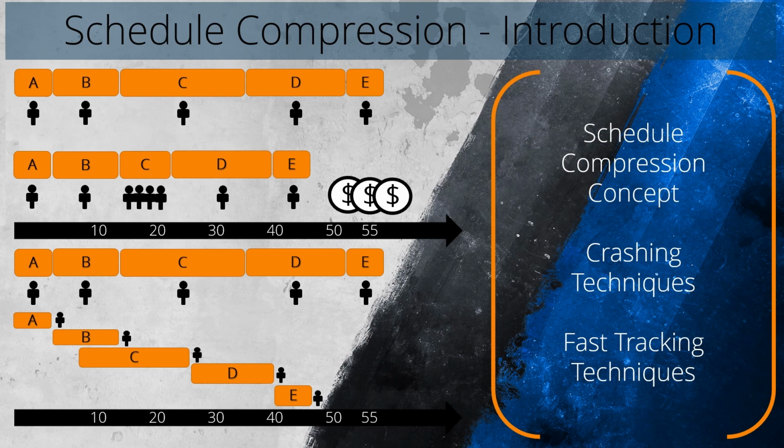For example, during the development phase, or activity C, there are subtasks involved such as front-end development and back-end development. Initially, these subtasks were scheduled to be executed sequentially. However, the project manager determines that with proper coordination and communication between the teams, these subtasks can be performed concurrently. By fast-tracking the development phase, the project manager expects to reduce the overall project duration.